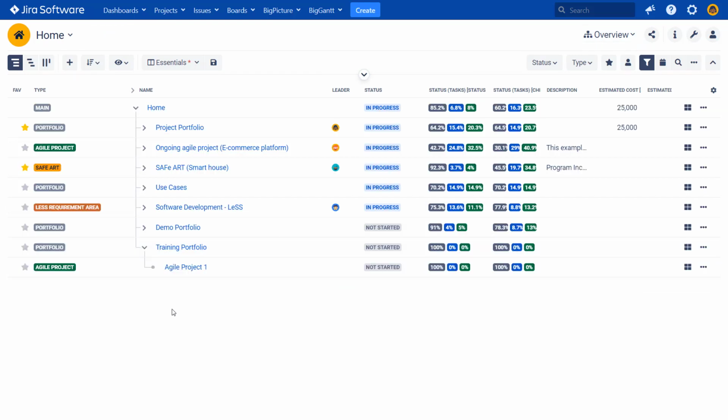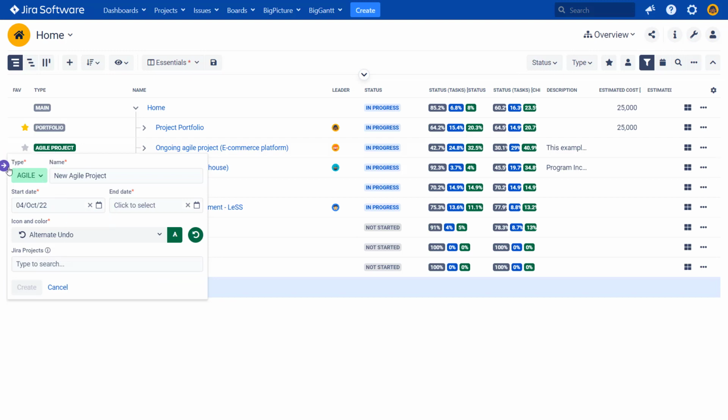Overview. Okay. For an agile project, what BigPicture requires is to have sub-boxes. So each time box that we have in our box, so for example, for Scrum, it will be each sprint, needs to have a lower level box that represents this sprint. So let's add that kind of a box. Let's indent this.